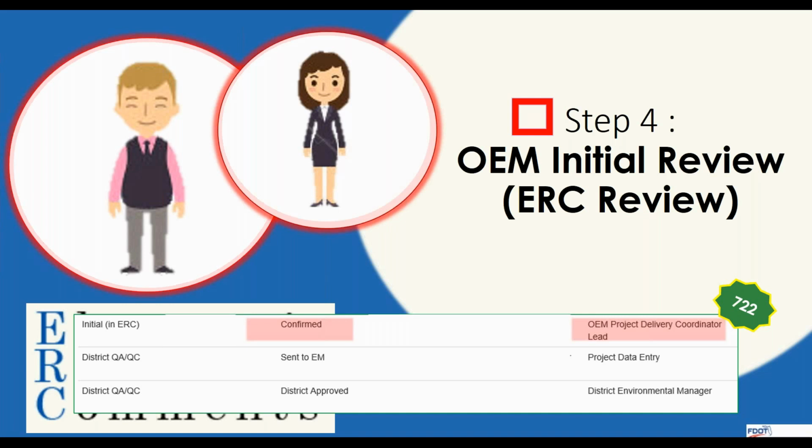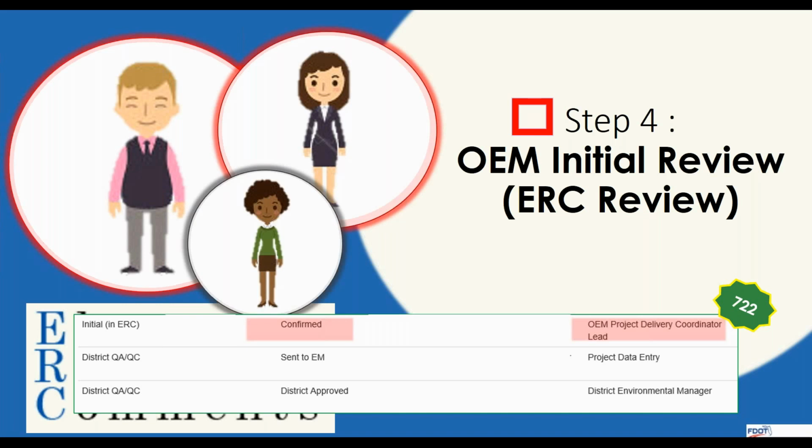So your project development engineer and your PDC are going to review your environmental document. If general legal review was requested, OGC will also review the document. The team will send comments to the PDC and coordinate with the PDC, and the PDC will upload the comments to ERC within those 30 days for the district to address. The project editor is then able to grab those comments from ERC and go into SWEPT to revise the document.